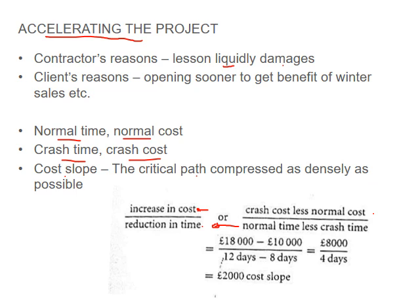For example, if the project had a normal cost of ten thousand pounds and when accelerated the cost is eighteen thousand pounds, your cost slope is eight thousand divided by the difference in time. Normal time is twelve days, crash time is eight days, giving four days difference, so you divide the cost difference by the time difference to get your cost slope.